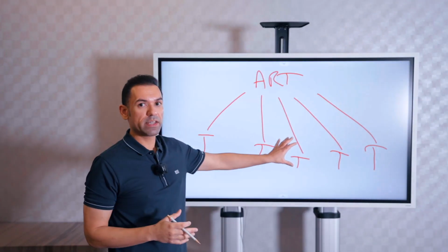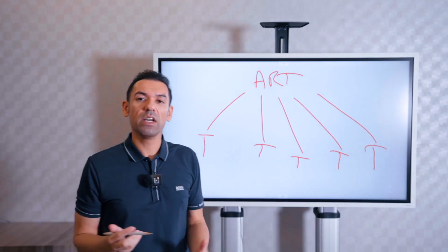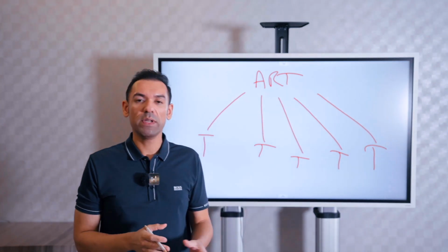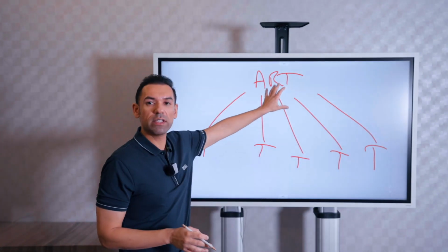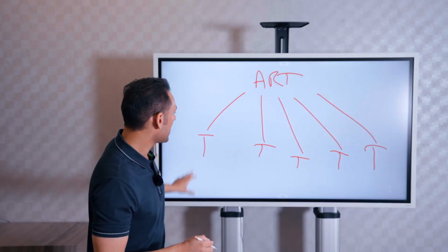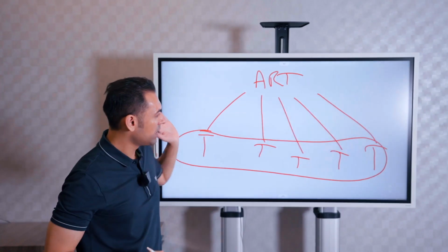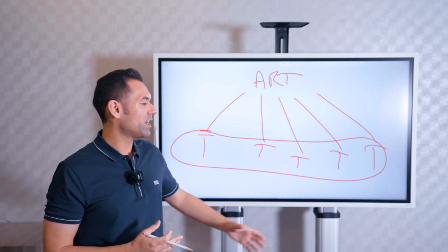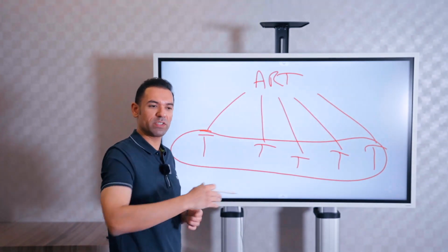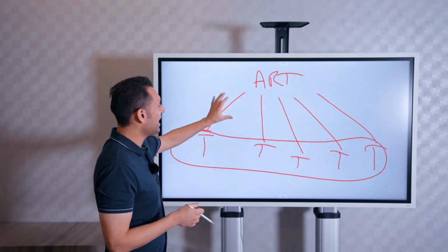If you didn't have a mechanism to coordinate these teams, they will just go out of sync, out of correlation, and there'll be hanging dependencies all over the place. So the Agile Release Train mechanism is a fantastic way of grouping these teams together and sending them on a train metaphor, which is stopping by each station, which is the cadence, and delivering value output accordingly. So that's the Agile Release Train.